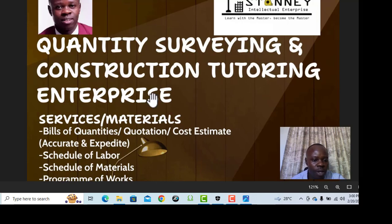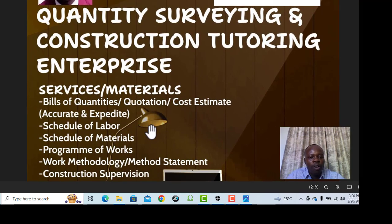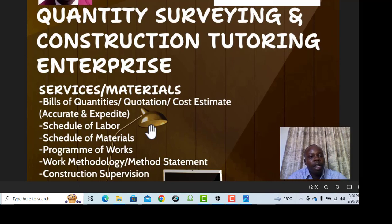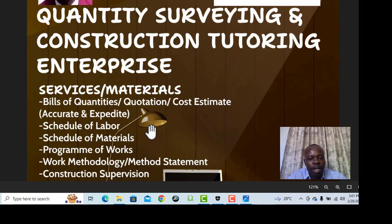Some of the items mentioned here cannot be well understood by the final consumer — the clients — and that is why we talk about the schedule of labor and schedule of materials, which are basically a further breakdown of the bills of quantities in a form that can be understood by the majority, especially clients. When you make a schedule of materials you are able to show, for instance, how many bags of cement you'll need for a given piece of work — making it easier and more consumable to clients.